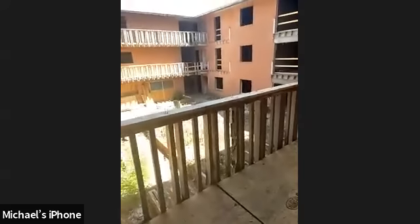So we're going to add draft stopping into the attic. Is that between each unit, or is it going to be just on whatever? How's that going to work? Can you repeat that? For fire in the attic, are we going to have draft stopping between each unit? Yes. Block walls go up all the way through. Where we do not, we will have draft stop. Okay, awesome.